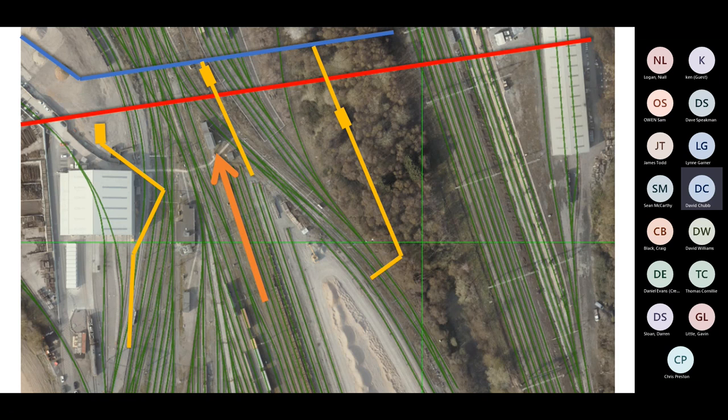So why is that a problem? Well, what it means is that suddenly we've now got to worry about how we dig this thing. We've got running sand on the left-hand side. That's why we're microtunneling. That's the problem I mentioned to you before. In the middle, we've got to get past the Cadent gas main and underneath the thick scissors. Pete Verriard is currently looking at me with utter disgust as I say that, because we've got to somehow make it from one place where we can drop a chamber to put the launching microtunneling machine into, to another place where we can get it out the other end.